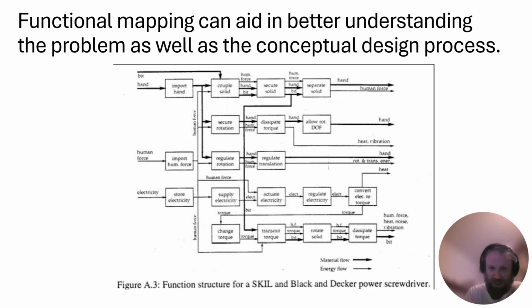So there should be a log, if you will, of potential failure mechanisms as well as an understanding of the severity of those failure mechanisms as you progress throughout the project. And this will be easier to do when the design moves into the detailed design phase. But at the same time, it should be a running or live document of some sort in which you consider some of these potential modes for failure.